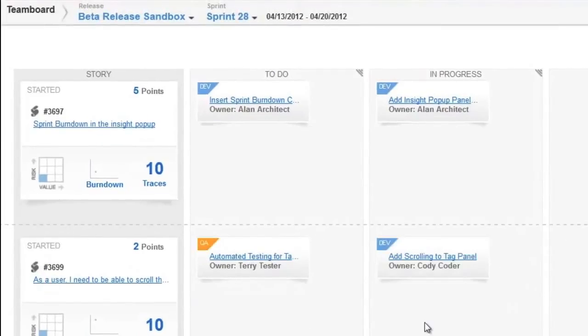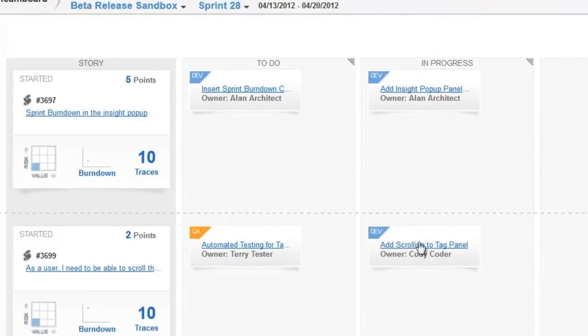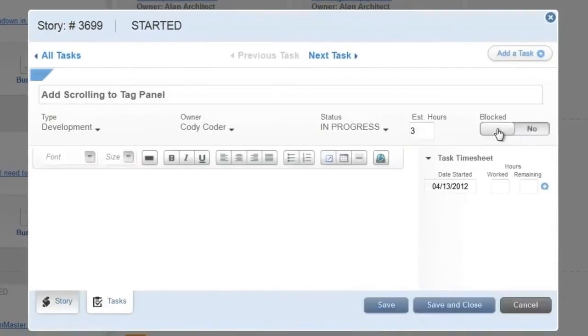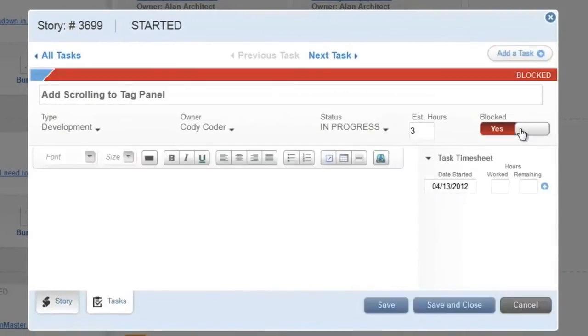When there are obstacles standing in the way of completion, the task can be marked as blocked, indicating that work has stopped and other changes are necessary in order for progress to be made.